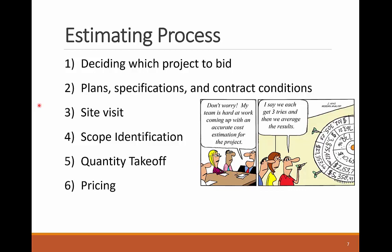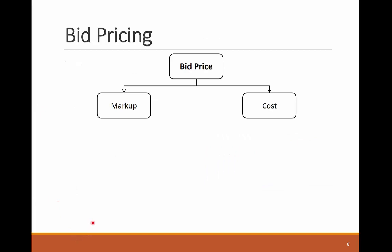Sixth, price each bid item by estimating its unit cost and price. This requires detailed analysis of the operations in each bid item in terms of the resources needed and the sequence of those operations. The pricing step is very critical, so we'll cover next what items need to be addressed when pricing a bid and its work items. You need to structure the bid estimate in two main components: cost and markup. There is a big difference between cost and price, as we'll see next.